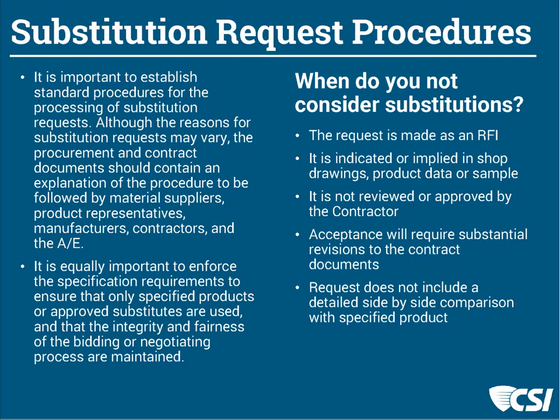Contractors don't send substitution requests from a sub without reviewing it themselves as the general contractor. It is not something that suddenly changes the contract price or contract time, and you certainly don't consider it without a detailed side-by-side comparison. Those forms help the general contractor do that comparison before forwarding the request to you.